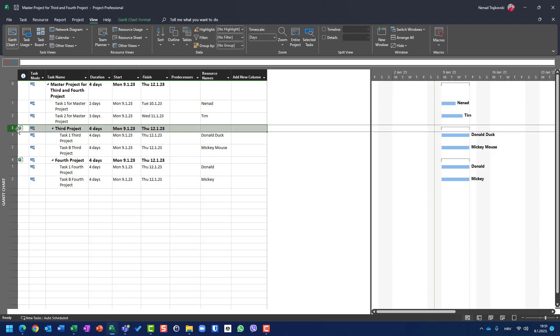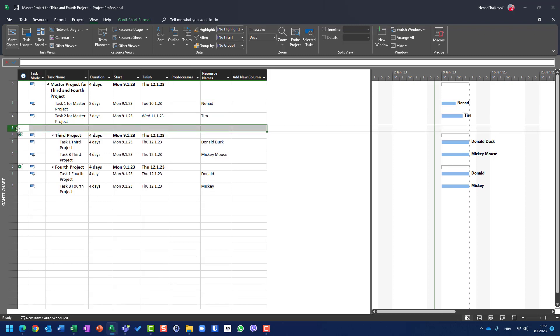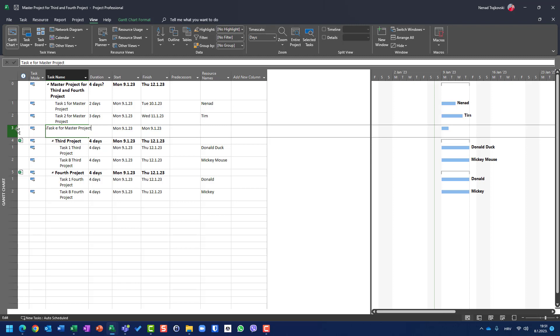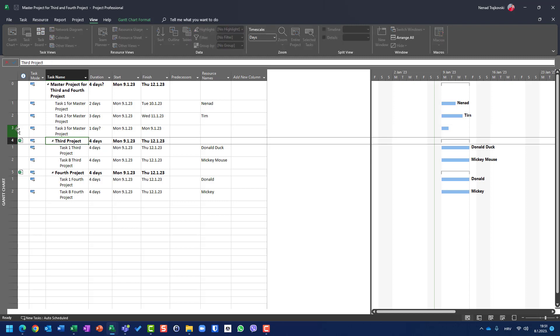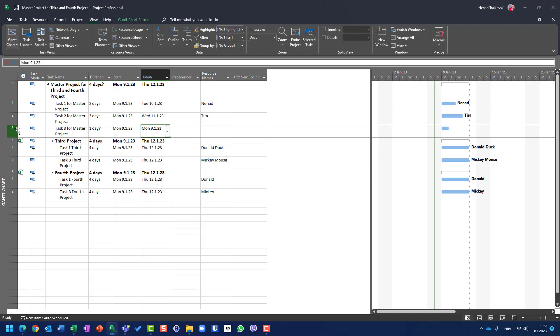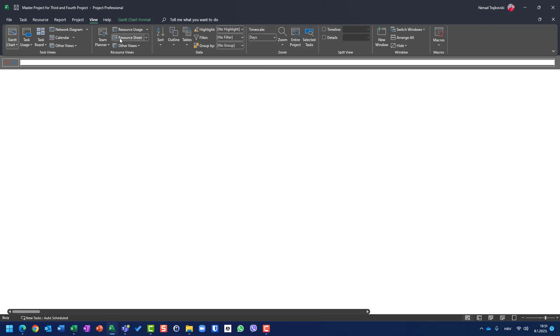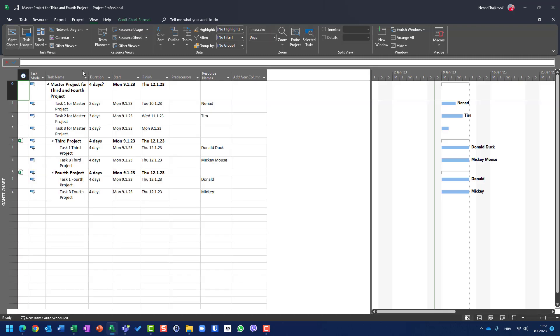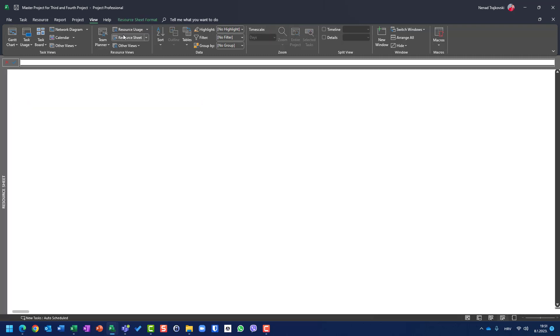You should go to Gantt chart and on that specific task here, put Nenad. And you will see that I can use it here and put here Tim. And I can use Nenad and Tim in every single task. Let me add third task. Let me copy this one, let me rename it. Task three. Nenad and Tim are here.